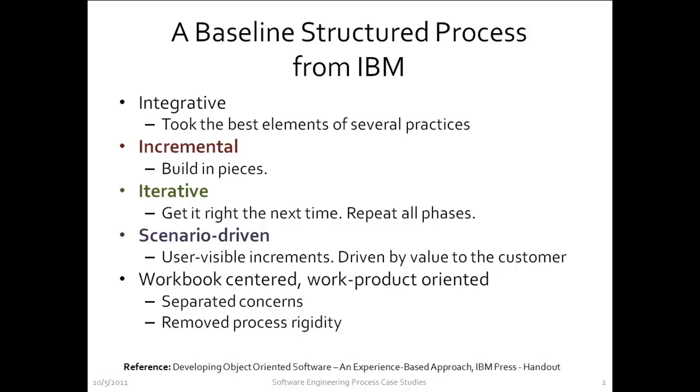So iterative is similar to incremental, in that you want to build it in pieces, but iterative adds on to incremental by saying that you can revisit any of the phases during every iteration in the building of the system. Incremental simply means building it in pieces. Iterative means you can start with requirements and go down through deployment and testing for every phase. So if you didn't get it right this time, you could get it right the next time.